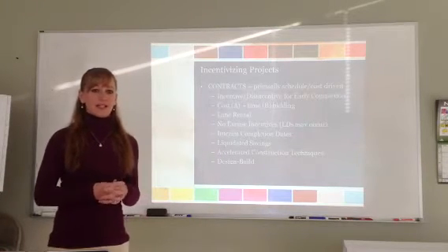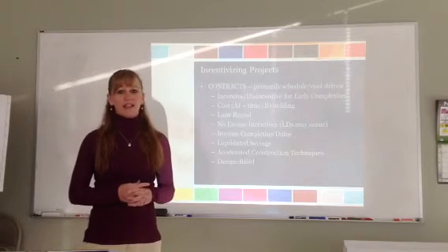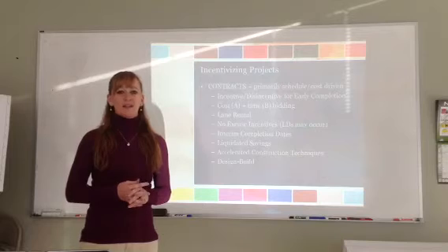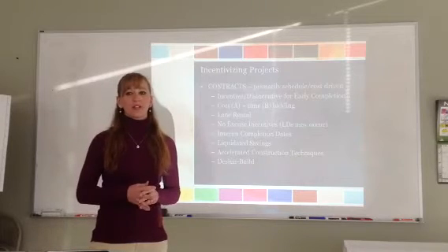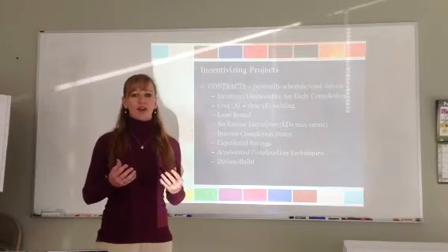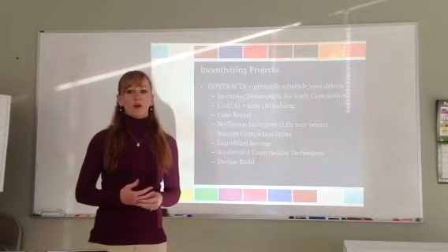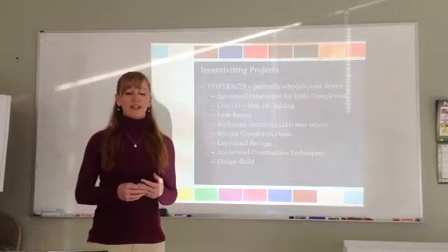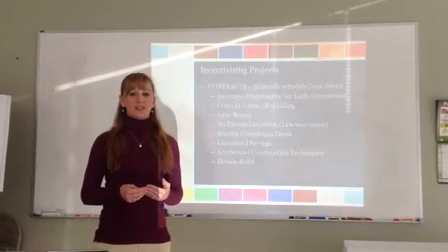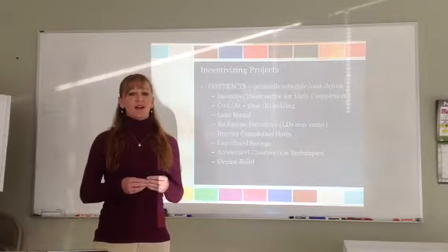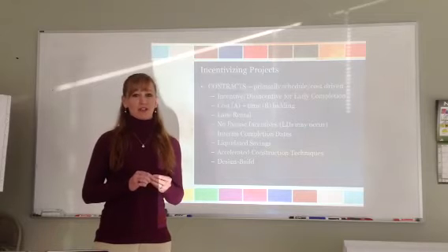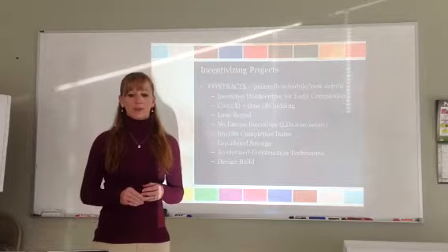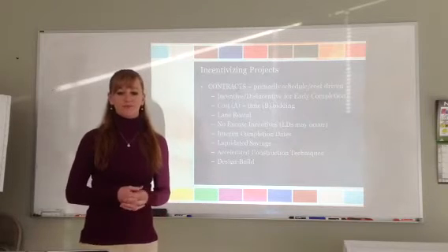There also is a lane rental contract, and that takes into consideration mostly heavy civil projects, and the important part there is the owner doesn't want to close down that street or highway for a long period of time. And so applying a lane rental rate allows that company to try to minimize their lane rental costs and either work at night or provide a detour for pedestrians and drivers, etc.